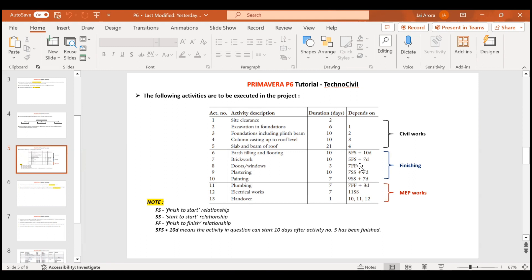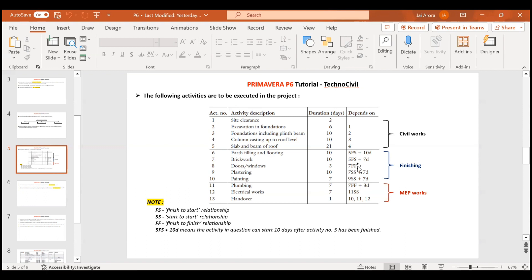Coming to FF — doors and windows has a relationship of finish-to-finish with brickwork. That means doors and windows will finish only with the finishing of brickwork — brickwork and doors and windows have to finish simultaneously.